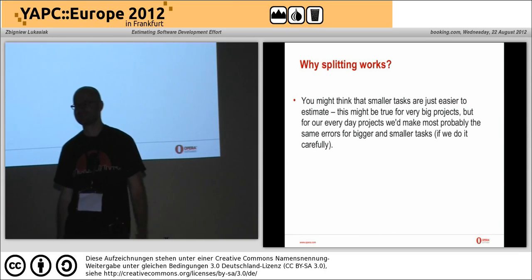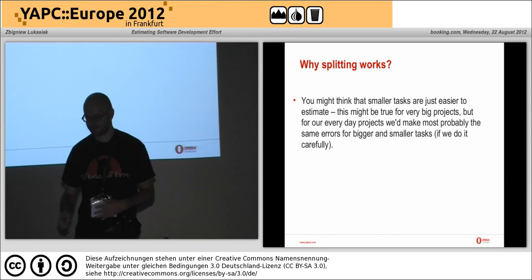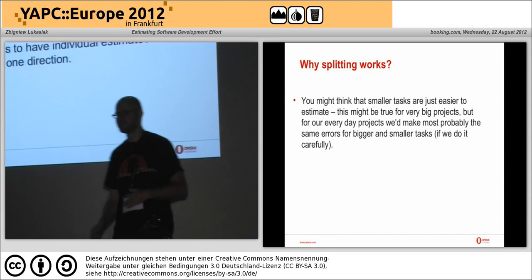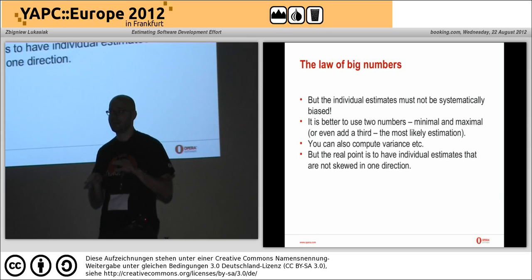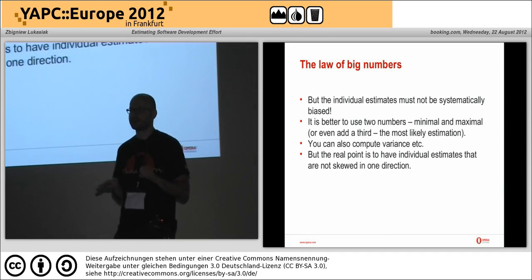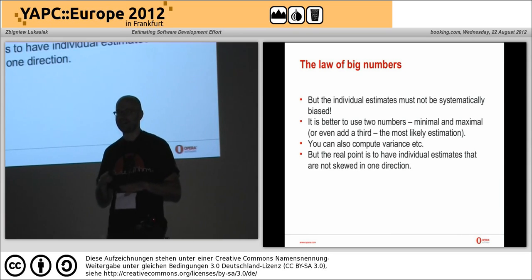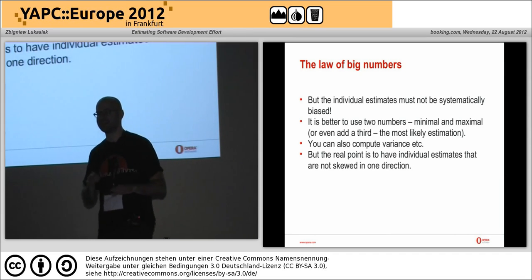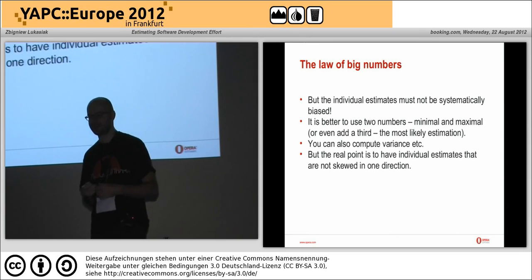There's also the idea that errors will cancel each other out - that's the law of large numbers. It works when individual estimates don't all have errors in the same direction. But if your estimates are systematically biased - always underestimation - it won't work, because the errors will add up and you'll end up worse than estimating the whole project at once.